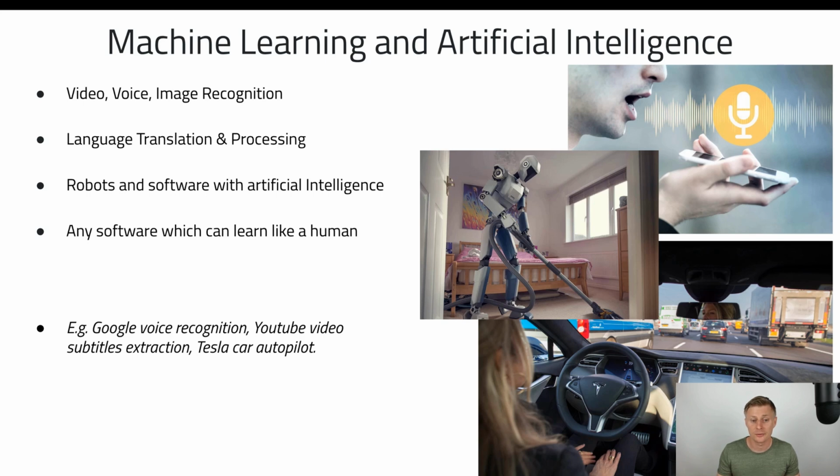This is also machine learning and artificial intelligence software with hardware. Programmers have a lot of ready-to-use libraries to build such artificial intelligence integrations. But similar to virtual reality, such integrations still require a lot of custom software development. Functions which involve machine learning and artificial intelligence are hard to predict in time and money. Pretty often, such features can be implemented only with some precision percentage. You can never expect 100% compliance with initial specifications. This is because of the nature of machine learning itself.